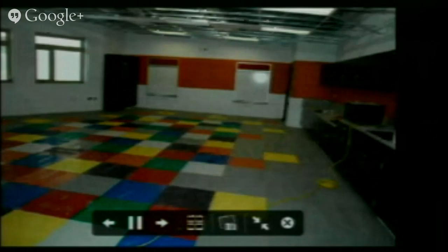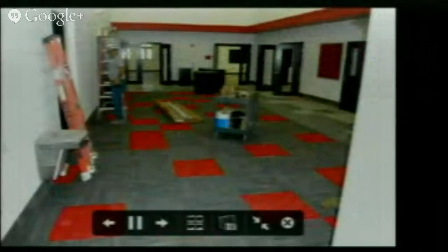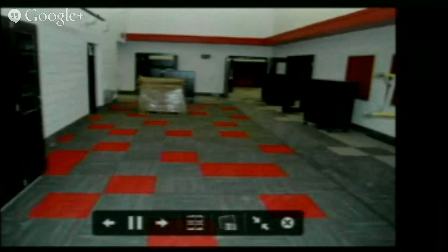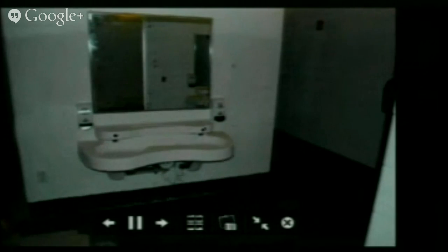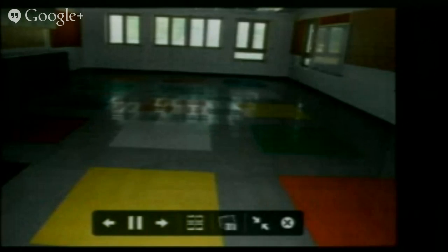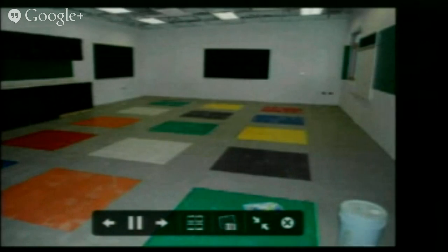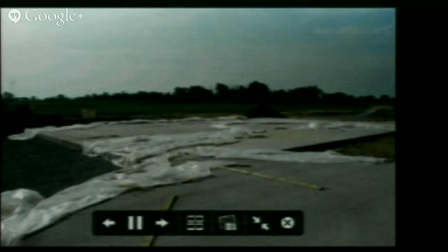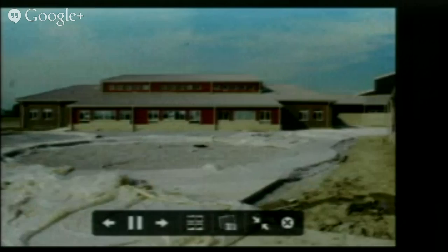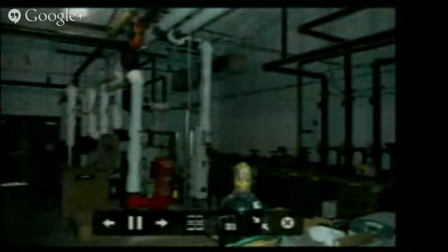Now going outside, as far as the roof and siding goes, they're doing their trim work, and then they're going to start their contractor's punch list on that area as well. For the board, on July 1st, I found out the DMI, your roof manufacturer, will be doing their final audit that day. So we'll be here to do our punch list on top of their audit on the roof and the siding, because they'll do both of those. They're finalizing some of the window caulking and insulation along units A and B on the exterior. They have all the playground concrete poured. The playground installers are supposed to be coming today.